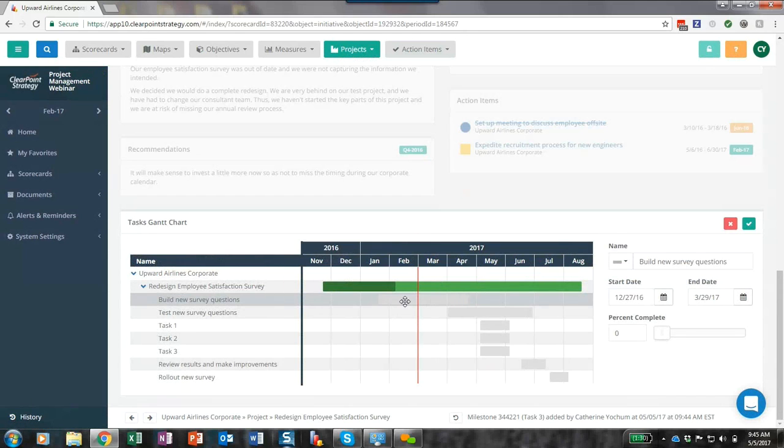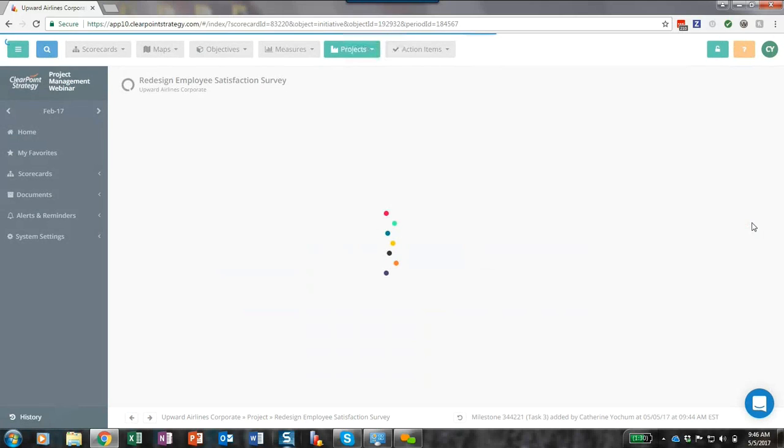And if I double click on the Gantt chart, you actually have a really easy way to edit those details. So I can click to shift the start of a phase forward or back, as well as adjusting the % complete. I could change the start and end dates manually, or I could click and drag to expand or decrease the length of my project. And then I can also change the status right from the Gantt chart too. So this is a really easy way to see how your projects and the tasks within them stack up in terms of your timeline.